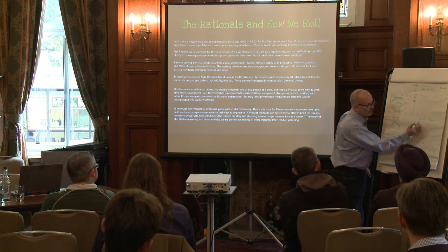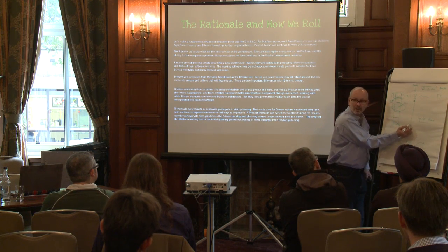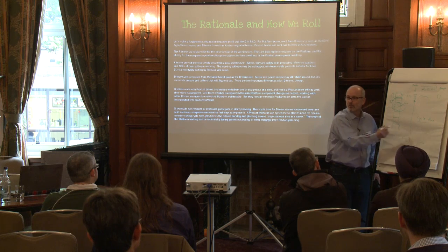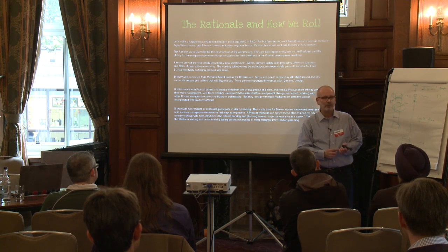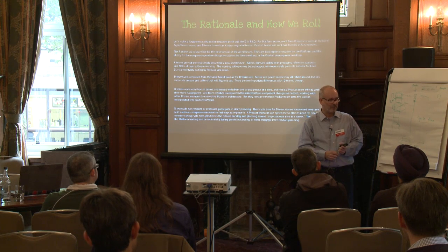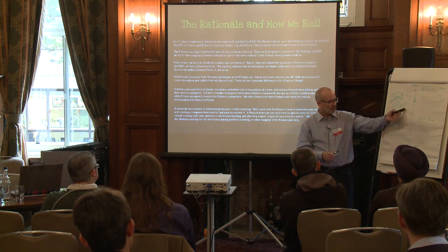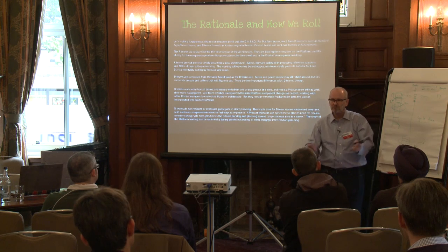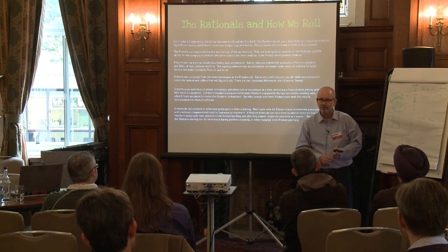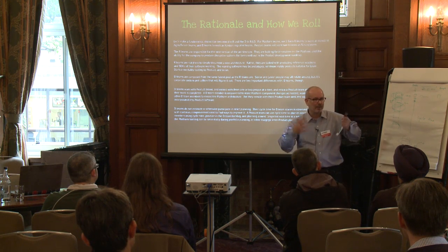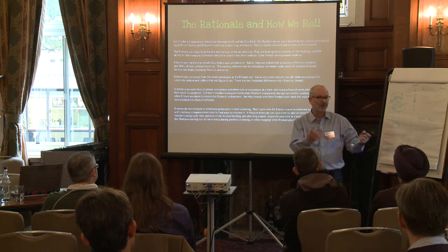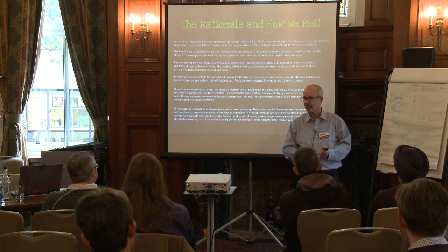But we can see that based on the cycle time and the number of items that are in the ready queue, our lead time for this is going to be an iteration. So our planning will take place at that last responsible moment. And once we have some history with this stuff, it gets pretty good. So we can break that dependency planning that we otherwise did ad nauseam up front.